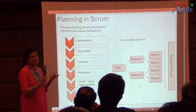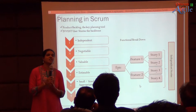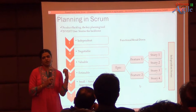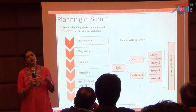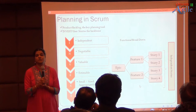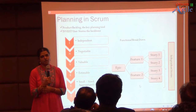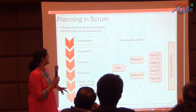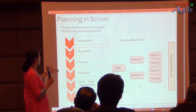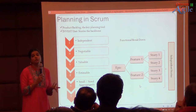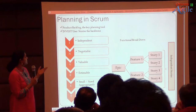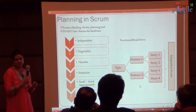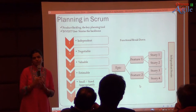How is planning done in Scrum? Unlike a traditional WBS, in Scrum we do planning through the product backlog. The product owner writes user stories into the product backlog. We talk about the INVEST principle — user stories should be independent, negotiable, valuable, estimable, and small.